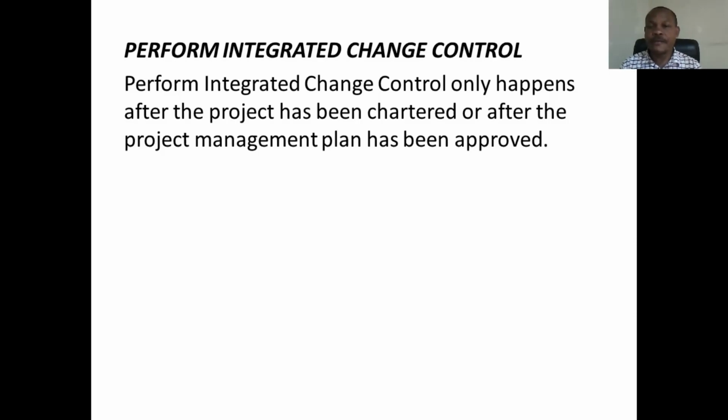So if you have to raise a change in the predictive methodology, you will have to inform the stakeholders, tell the bosses, tell the investors, let them be aware, and not just aware, let them know the impact of the change. There has to be an approval. Then if it's approved, they will be in the picture. So if anything goes wrong later on, they will also bear the risk. So that's the essence of performing integrated change control.